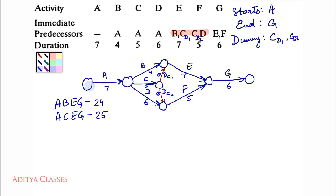Then we have another path A, C, dummy, F and G — which we call A, C, F, G. Duration: 7, 5 — giving 12, and 5 — giving 17, and 6 — giving 23.